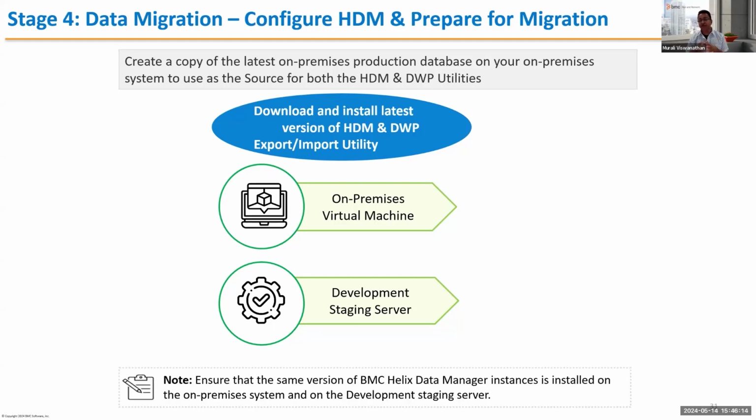And of course, before you start any migration, make sure you have your static database with a copy of your on-premises production. That's very important, because we don't want you to pull data from a live database for the initial migrations,